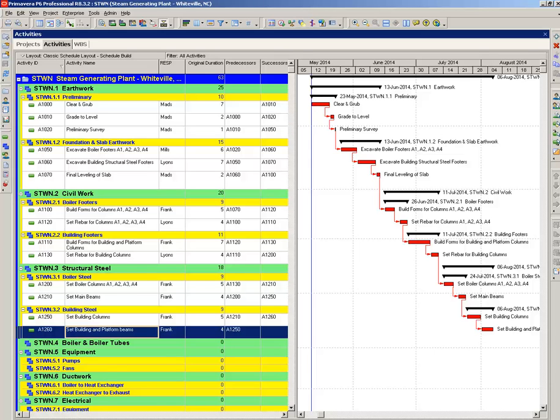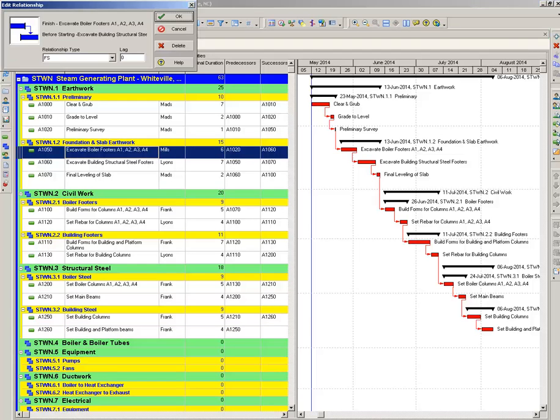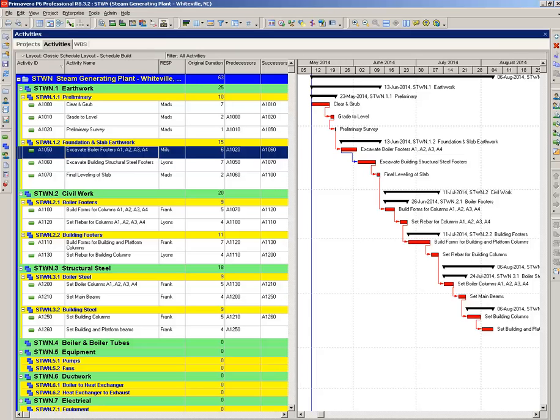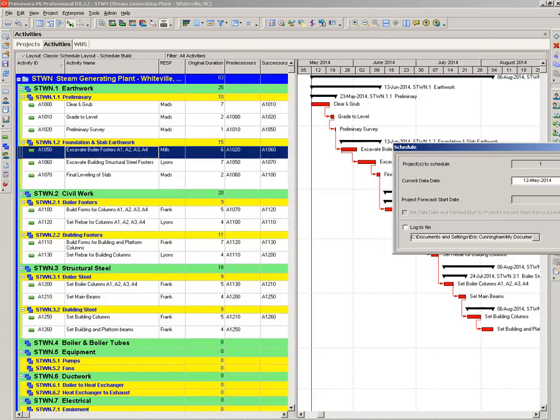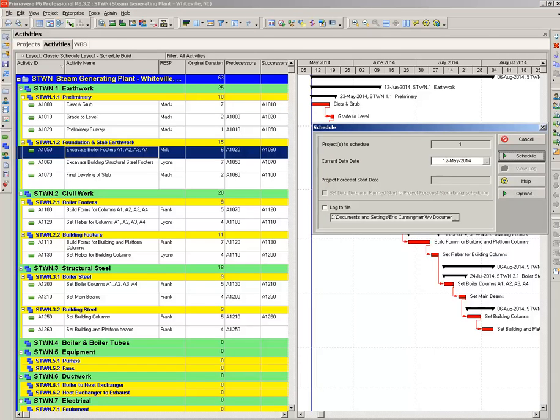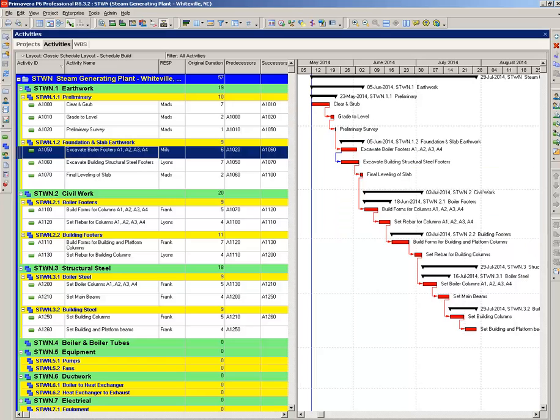And we have just scheduled this entire project with finish to start relationships. In real life, you'd go back and you'd change several of the pieces of logic, for example start to start, finish to finish, and so forth. So you could do this: let's just start the excavations at the same time. Change that to a start to start. Reschedule. And you see those are start to start.